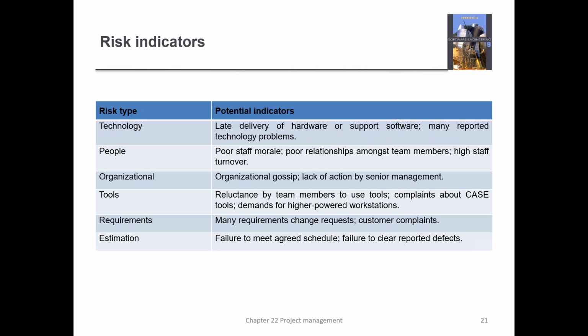And you have to indicate what that requirements change will do to the software product that is being developed and the project itself. So if you have a client who keeps adding requirements or changing requirements or complaining about something, then you know that you're going to have an increased probability of requirements risk.